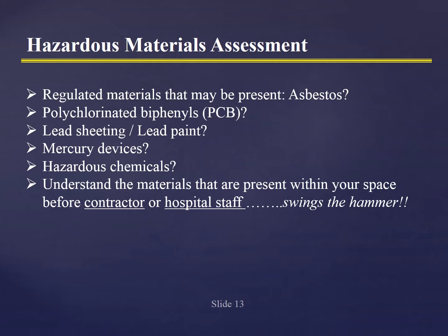Again, understand the materials that are present within your space before contractor or hospital staff swing the hammer. And I think that's the critical thing, is you need to know this ahead of time. Nothing worse than getting into the middle of a project and then running into the stuff, and everything comes to a screeching halt. And next thing you know, you find out you're going to have a very long delay, or a very urgent, expensive assessment or remediation taking place that nobody planned for. Never a good thing.